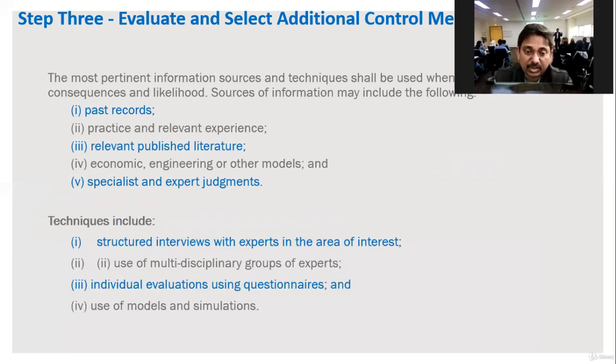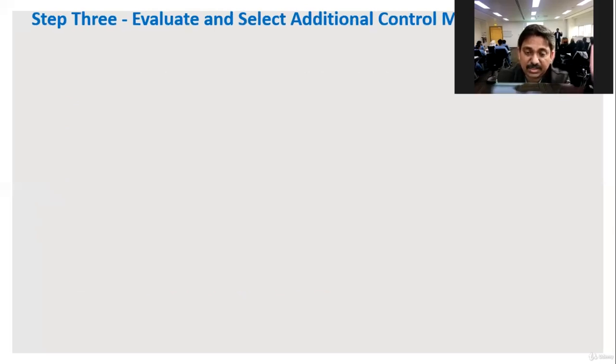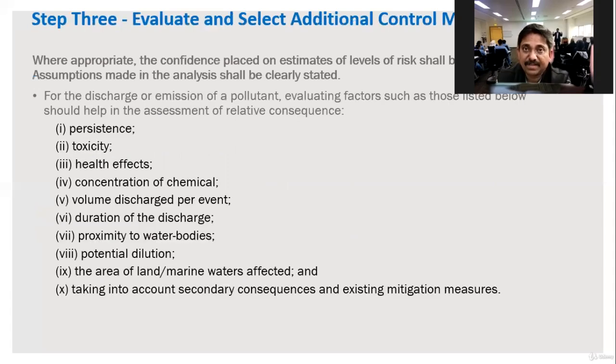Techniques include structured interviews with experts in the area of interest, use of multidisciplinary groups of experts, that is your specialized people in the departments, individual evaluations using questionnaires, and use of models and simulations where appropriate. The confidence placed on estimates of levels of risk, the assumptions made, and the analysis shall be clearly stated.